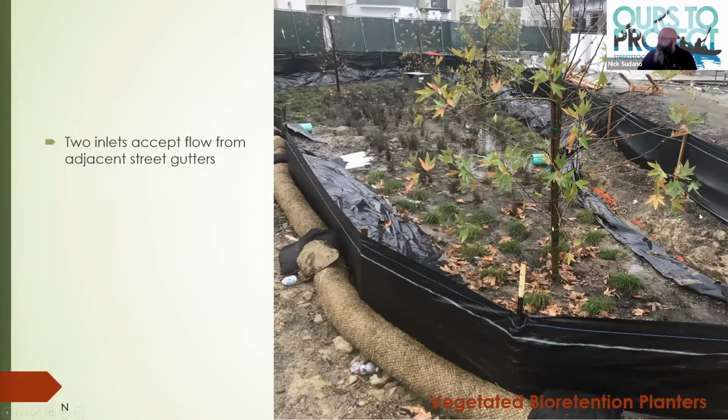We've got some undermining under the silt fence here. We've got some erosion coming down on the sides. These are all things that we're looking for during construction and that we're considering during punch list, of whether or not we're going to accept, and whether or not it's reasonable for an owner to accept this from a contractor.